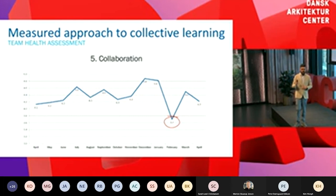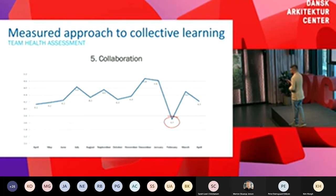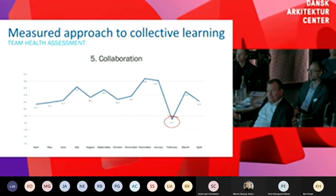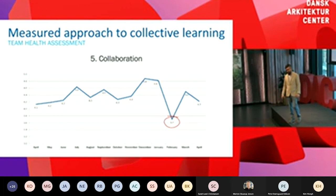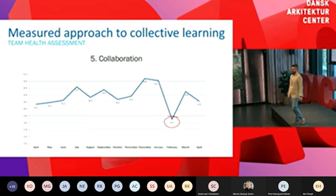So it turned out that due to production tracking, the electrician was reporting incorrect numbers, and the project engineer at the time actually was the one that reported it and said, well, they're showing 50% complete, but they're actually only 20% complete, so their numbers are a little off. So we did a deep dive as a team, and we learned, yeah, they're not accurately doing production tracking. So we addressed that as a team. We asked for more additional help on the electrician side. We offered to have our engineer help them on their side. And as you can see, the next week they were back on track. They were reporting their numbers accurately, and we could gain that trust back that we lost during that month of February.